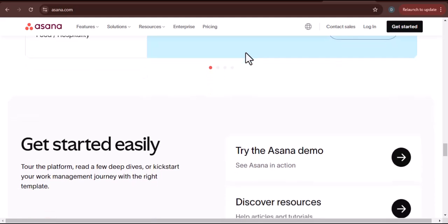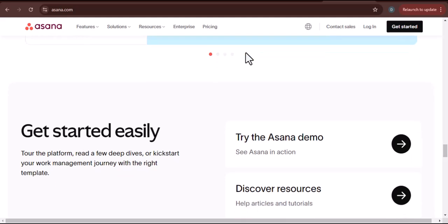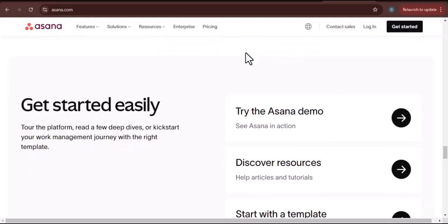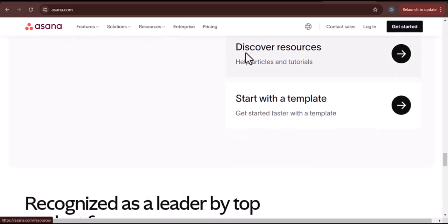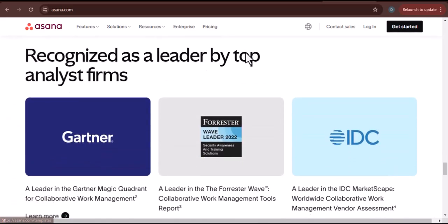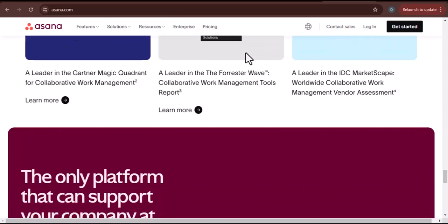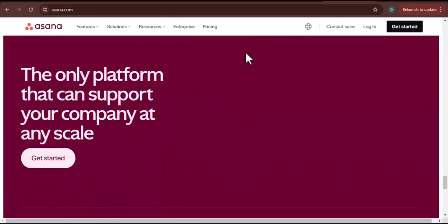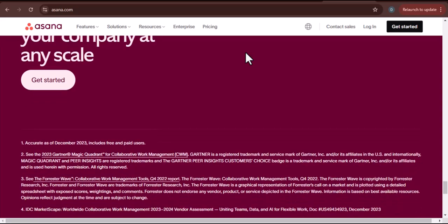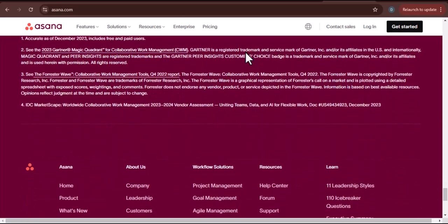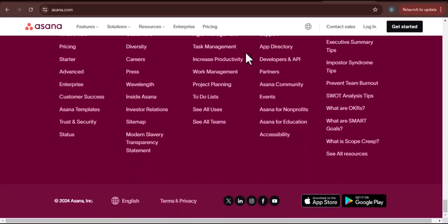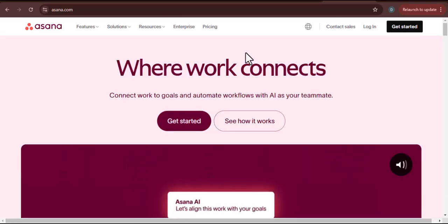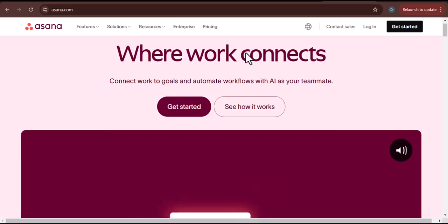What about forecasting? Asana can help with that too. By consistently tracking your estimated costs and actual costs, you're building a historical record. Over time, you can analyze this data to see where your estimates are usually off. Are you consistently underestimating the cost of contractor work? Or maybe you're overallocating funds for travel. This data helps you refine your future project bids and budgets, making your financial planning more accurate and reliable.